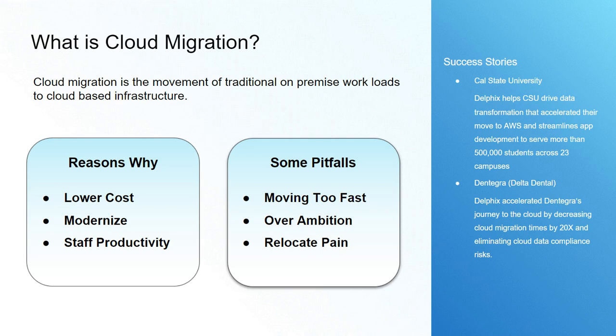Solaris is going to be difficult to move into a cloud. So they started by replatforming the Oracle databases from Solaris to Linux, implemented our masking product, and then migrated their non-prod workloads into the cloud. At this time, they're all in the cloud with their non-prod, and they're evaluating whether to keep production on-prem or to migrate fully into the cloud.